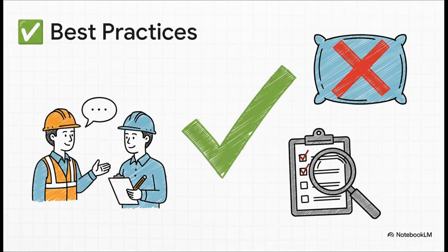So how do you stay sharp? How do you build that trust? Well, here are some best practices that are pretty much non-negotiable. First, and this is the big one, you have to involve people who actually do the work. If you need to know how long it takes to pour a foundation, you go ask the crew foreman, not just a project manager. Their hands-on knowledge is absolutely priceless.